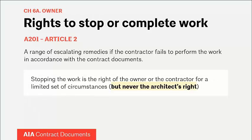A primary objective of the general conditions is to keep work going while problems or disputes are being resolved, but there are a few situations that allow either the contractor or owner to stop the work when resolution can't be reached. The owner's rights to stop or assume the work are good examples of owner power and leverage. It is never, never, never the architect's right to stop the work at any point, at any time, or for any reason — that is solely the owner's responsibility. Architects need to know the difference between actions they take and those reserved for an owner.